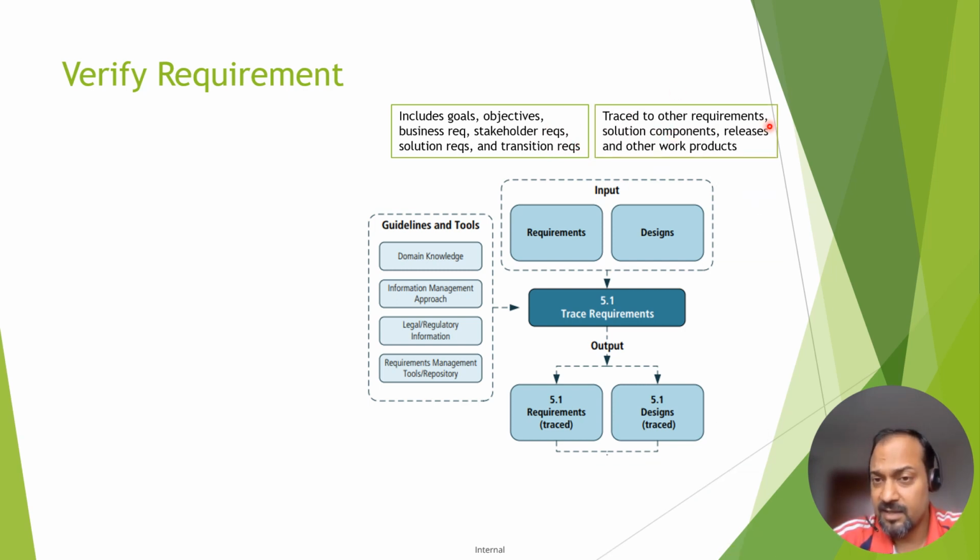which is traced to other requirements, solution components, releases, and other work products that are related. The solution is the release that we are saying. So generally, when you create a release, you map the requirements with the release, a bunch of requirements together to map with a release, as a complete package that will act as a solution.